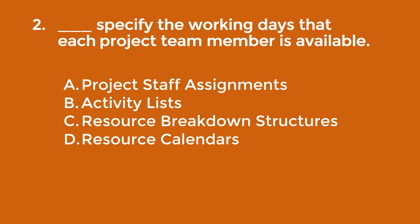Which of the following specifies the working days that each project team member is available? The answer is a resource calendar. Project staff assignments tell us who's assigned to the project, and the resource breakdown structure is just a hierarchy of resource types. Neither actually tells us which working days team members are available — that's where the resource calendar comes in.